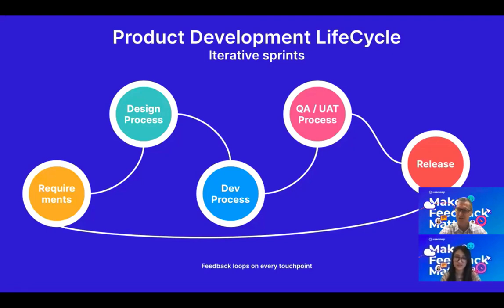You had a requirements definition step, then a design or concept phase, then a long phase of development, and then in most project plans a short time of QA, and then you would release the software. But as we all know, that QA phase potentially dragged the projects on and on and on.